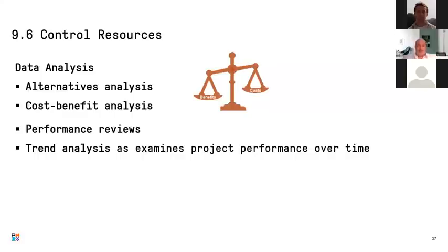Let's say one day it is only making 9 kilometers as a performance, but the other day it's doing again 10 kilometers. So this is, let's just say, a hiccup, a small thing during the overall performance of this physical resource. But if there is a trend, so first day is 10, second day is 9, third day is 8. So there is a trend, there is something continuously wrong about the performance of this physical asset. This is a big indication that there is something that needs an immediate attention and needs that we are looking into this immediately to make the corrective action.